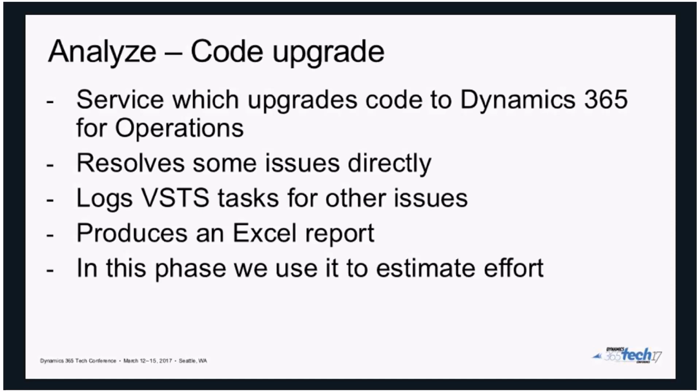We use it as an estimate of effort, or when you are ready to do the actual code upgrade, you connect Visual Studio Team Services to your LCS project, and that will result in the upgraded code base checked in inside VSTS. As soon as it's checked in within VSTS, you can synchronize with your development environment and perform all the manual tasks for the code upgrade and complete the end-to-end code upgrade story.